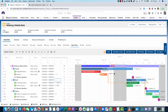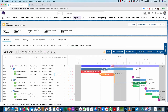Now that those dependencies are in place, if I reschedule an action — say it now takes two days instead of one — everything will automatically reschedule by the same period of time. Because that action is dependent on the overall milestone and we haven't gone past the deadline, that's why the downstream item didn't move out in this case.